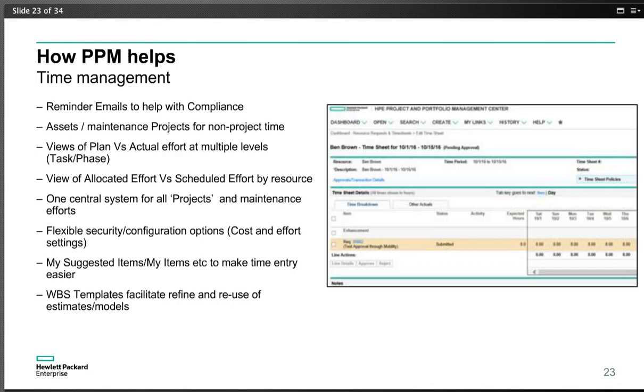The main goal and idea with that is obviously so you can use this information, close the loop, and the next time you do the project, you can really incorporate this information either into your new work breakdown structure template or even your portfolio analysis, so that instead of budgeting 300 hours, you're going to budget 500 hours for that particular piece of work.